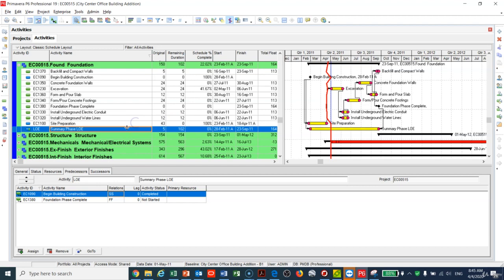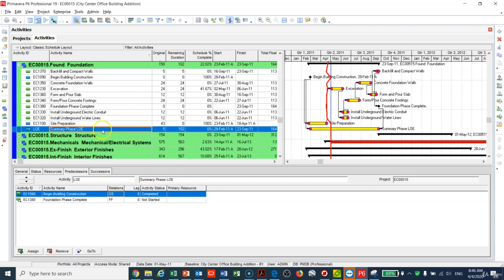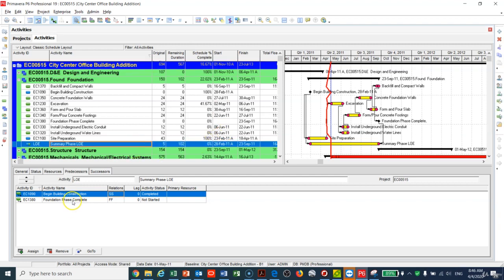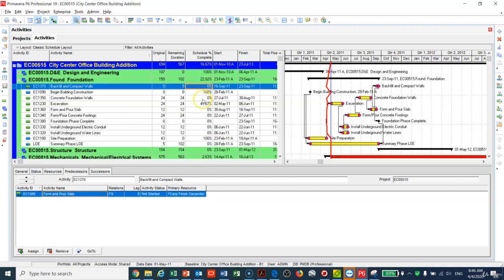Note that the Level of Effort shows an original duration of 5 days but a remaining duration of 102 days. This happens because when the activity is added, the program assigns 5 days by default, but the remaining duration reflects that this LOE is tied to an activity that has already started and has actuals. To update the Level of Effort, update its predecessor and successor activities, and the LOE will automatically inherit the dates from those two tied activities.